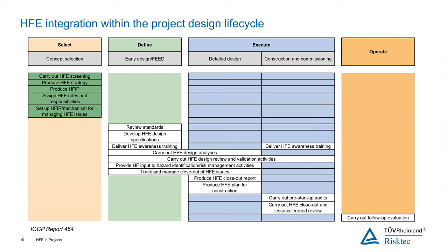So once you've done your plan, you can see on this slide a typical project design life cycle with the life cycle phases at the top. What we've been talking about now is usually concept selection, the early design phase. So all of this planning, screening, develop the strategy, produce the plan, assign the roles, set up the mechanisms, that all happens early on.